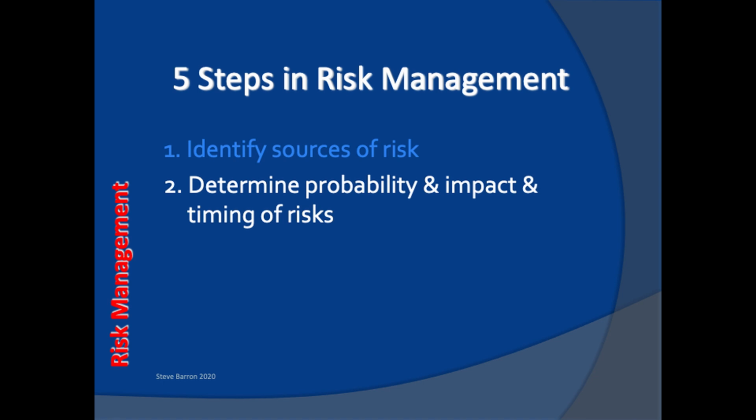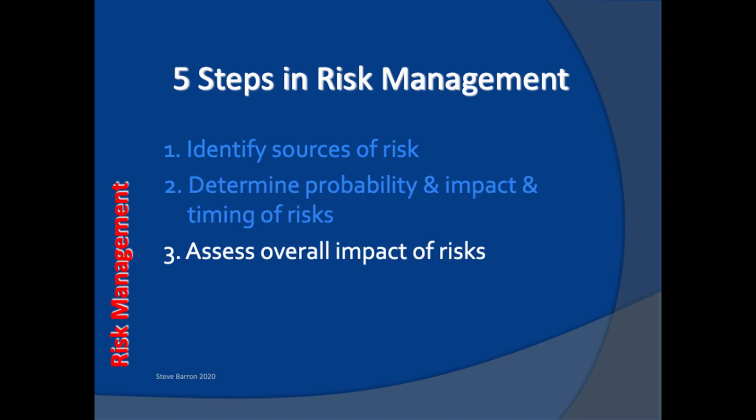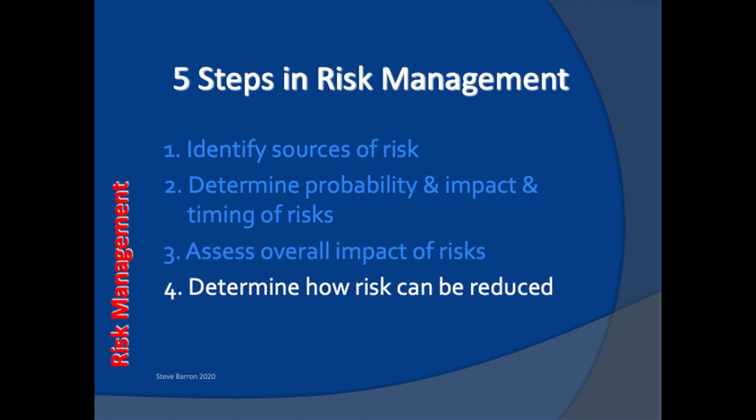It's also important to assess the likelihood or probability that a risk will occur. For example, it is more likely to snow in Siberia than it is at the equator. Once risks have been assessed in terms of probability and impact, they can be prioritized. High priority risks will need to be carefully monitored and managed throughout the project. These risks will require development of specific management actions in the form of mitigation and contingency.